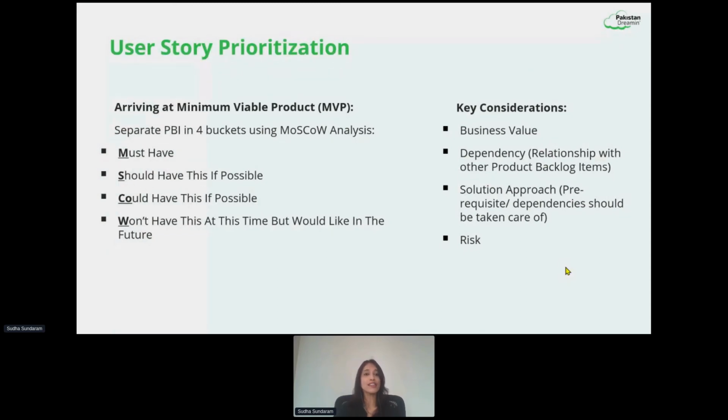So while we brought this up, of course, this became one of our main priorities, and the prioritization list went down a little bit, with security going up, and then the case management, and then the knowledge article, and then the Slack channels. So this is, again, just to give you a view of what could happen during the user story prioritizations and what we need to consider.